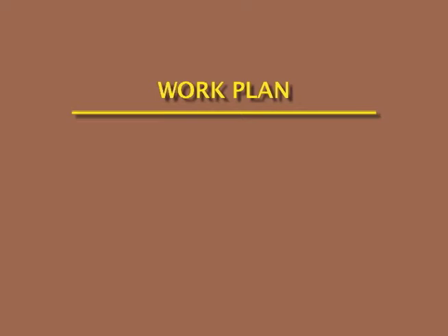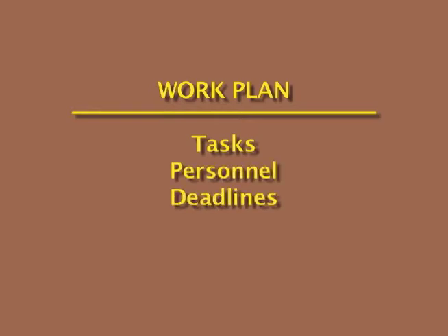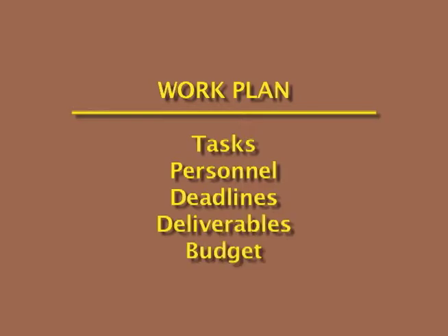And something that lays out all of the tasks, the deliverables, what you're going to produce, when you're going to produce those, and who's going to be involved with that project. I usually call that a work plan. So we develop a work plan that includes the tasks and the people that are going to work on those tasks, when they have to have something done, a certain deliverable, say it's a drawing or a specification. And then with that, you attach a budget.